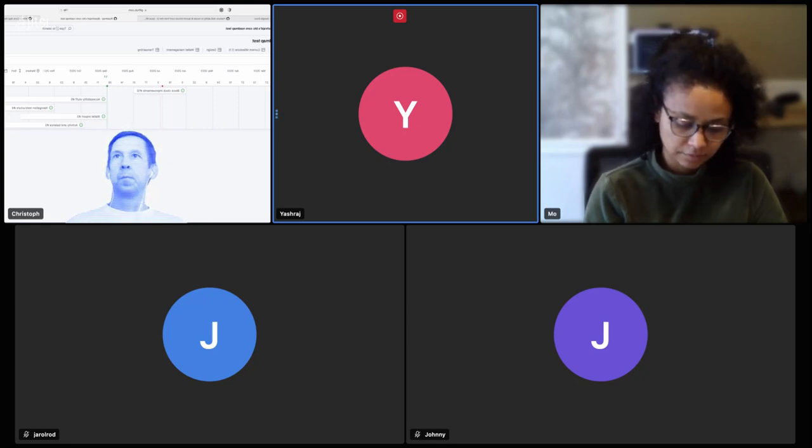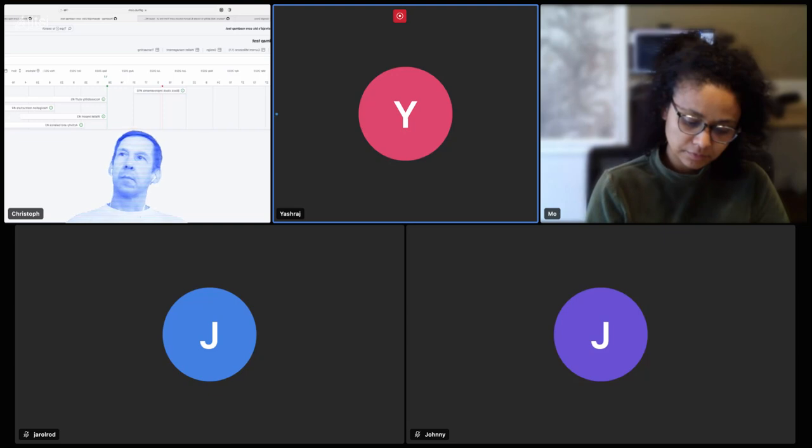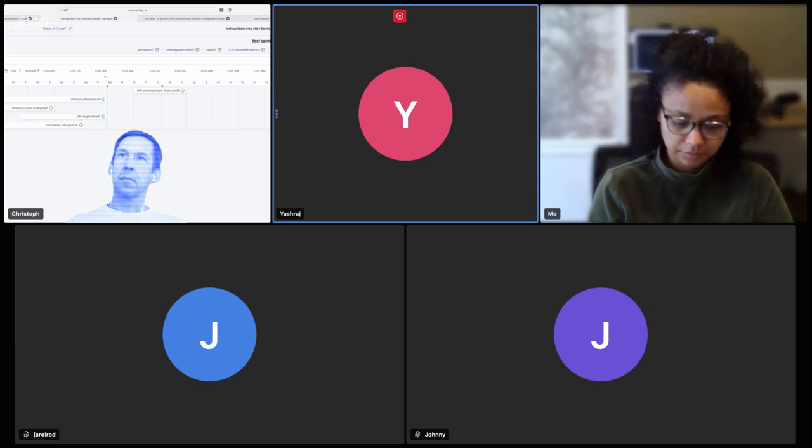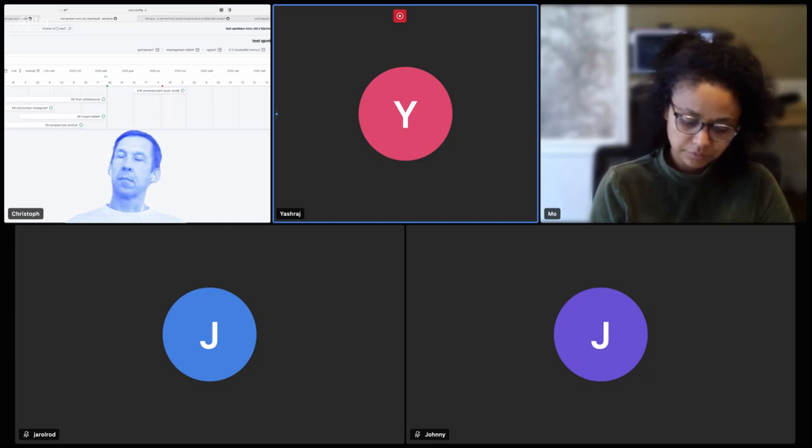And in this view we would only have epics, right? So we will have these big ticket items that will of course be broken down into a bunch of issues which are more actionable, right? And I just came up with a couple of milestones. I did a 1.1, 1.5, and then maybe we do a 2.0.